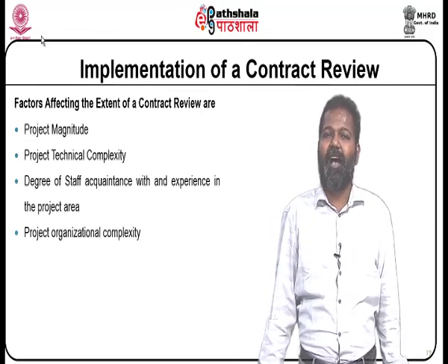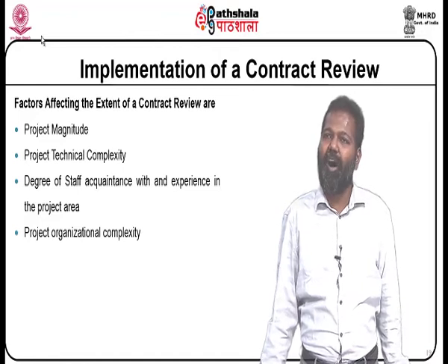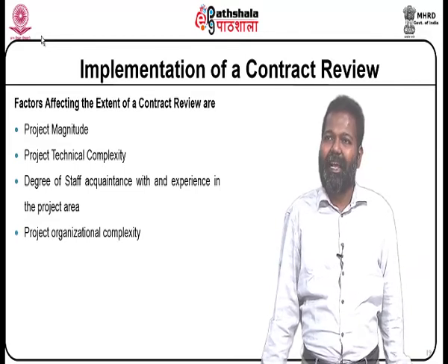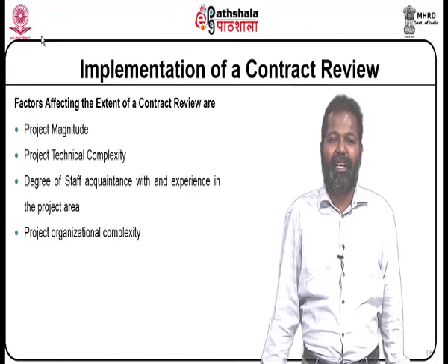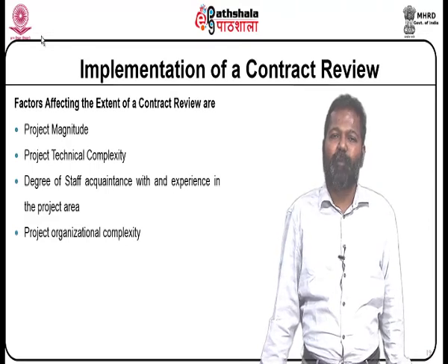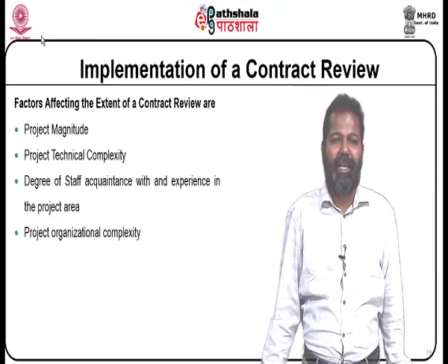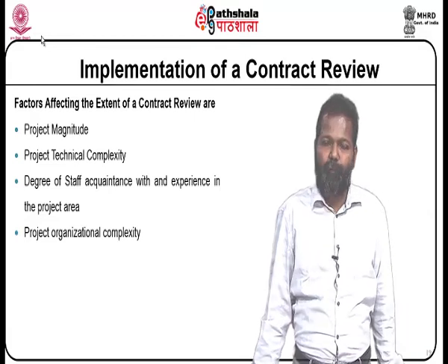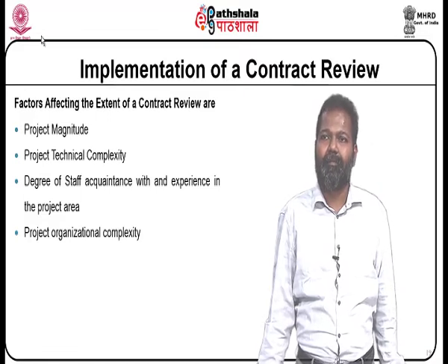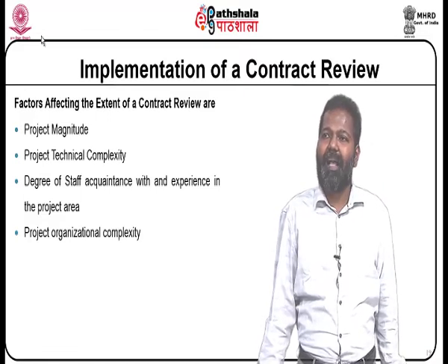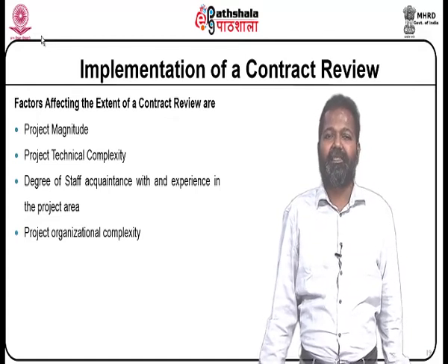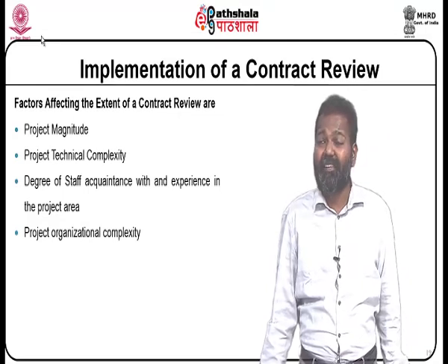Factors affecting the extent of a contract review are project magnitude, project technical complexity, degree of staff with experience in the project area, project organizational complexity. A project that is contracted has to be developed and deployed with high quality. The factors mentioned here play a major role.